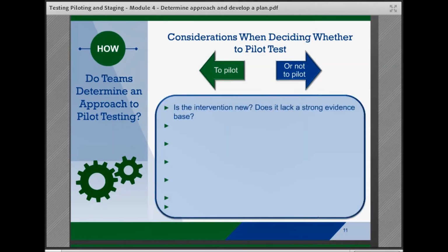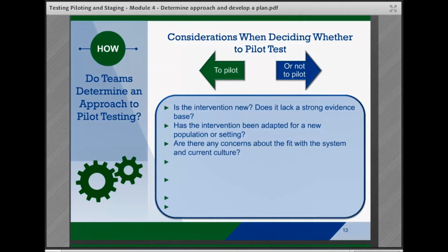Piloting is particularly important when one or several of the following questions can be answered with a yes. Is the intervention new? Does it lack a strong evidence base? Has the intervention been adapted for a new population or setting? Are there any concerns about the fit with the system and current culture? Is the agency unsure about readiness for the intervention?